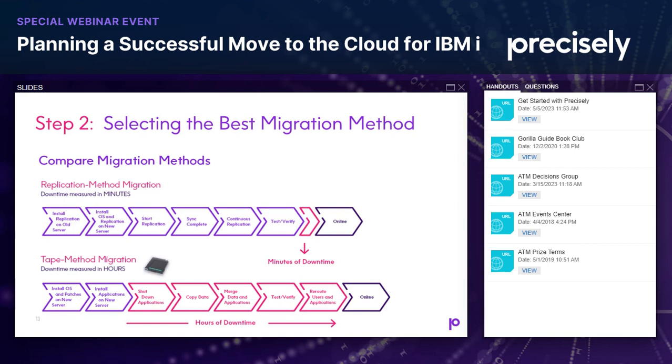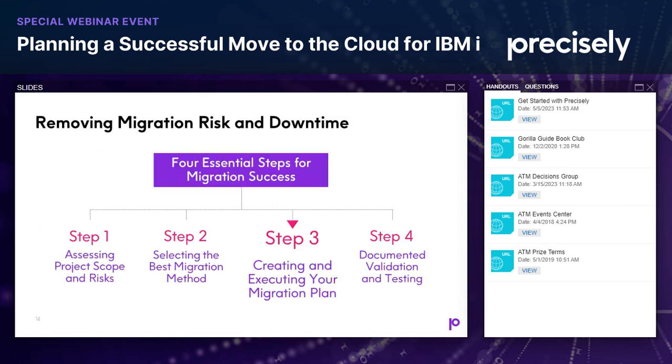So in essence, I've gone from a 48-hour outage on average in my old environment down to approximately 1 hour to quiesce the system, do the connectivity switch, and bring your users online, because all that testing, all that restore, all that data replication has been taking place for 1 week, 2 weeks, 3 weeks, whatever the schedule determines. So that is a significant difference between the two methodologies.